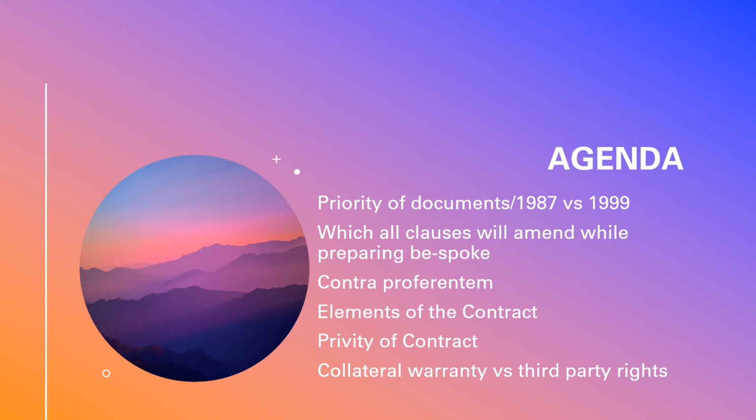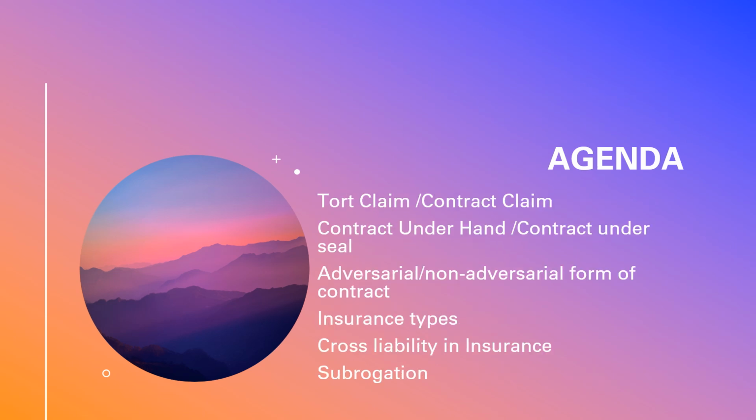So you are adding some provision into the contract so that the privity of contract can be lightly waived off. Okay, even though privity exists in the contract, you are adding third parties into the contract and you define them in the contract, and now you are adding some provisions also. This is called third party rights, guys. So that's it. I hope that's clear. The concept is clear with you.